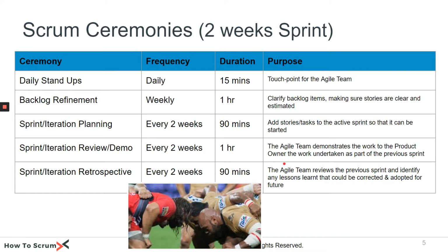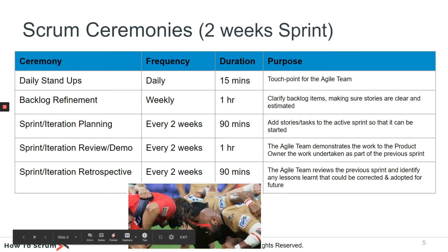The most important thing as a Scrum Master is to schedule the ceremonies so the team knows exactly what time they are. There is a daily stand-up, which is a touch point every day, 15 minutes, where they talk about, as a team, what they have done, what they will be doing today, and if there are any blockers for the Scrum Master to remove. It's a very good touch point for that, and they must attend, because it helps the team to move forward. As you can see, this is exactly what they do. They come together every morning to put their heads together to make sure that they are working towards the final goal.